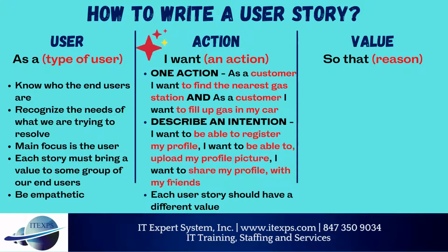For example, if writing, "As a customer, I want to find the nearest gas station, and fill up gas in my car," it is better to split it into two different user stories. So then one would be, "As a customer, I want to find the nearest gas station," and the other one would be, "As a customer, I want to fill up gas in my car."